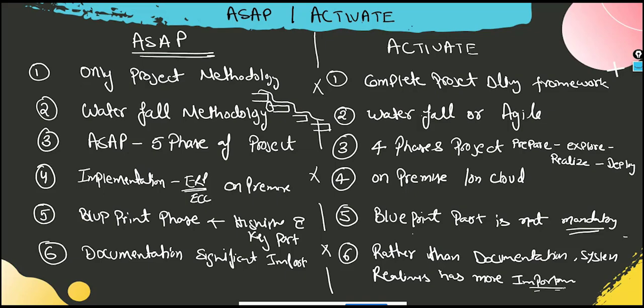Not only that you have created a design documentation, a PPT and a word document has been created, and based on that you will say that 20% project is completed. It is not allowed. Until unless your system is not ready, Activate does not allow you to show the project progresses.